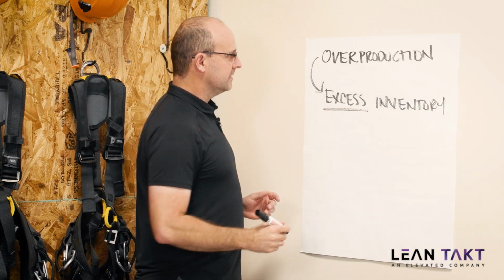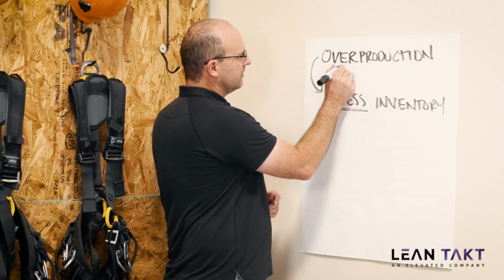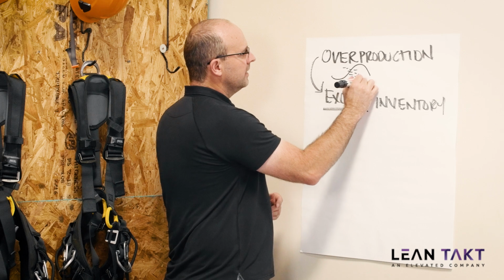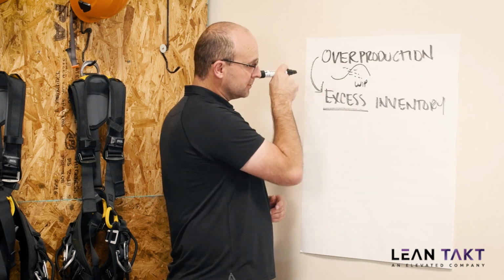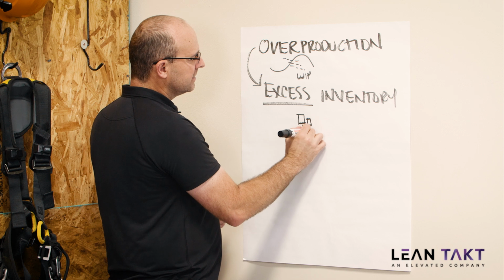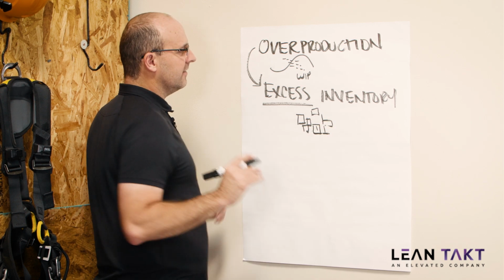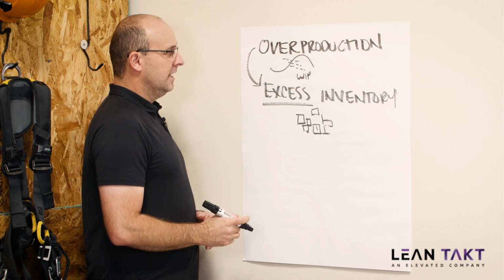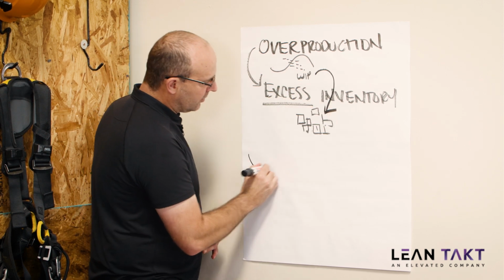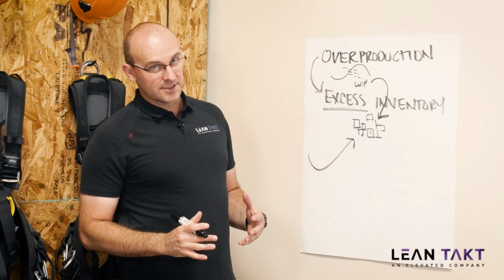But the bottom line is, if you overproduce something, like you're following your CPM schedule and you have lots of work in process and you overproduce, now you have lots of materials and things sitting around, work that's getting rained on, damaged. You have a lot of stuff, okay? You have a lot of stuff. So that either comes because you're making it too fast or you've brought materials to the site not just in time. Ooh, this is a good video so far.